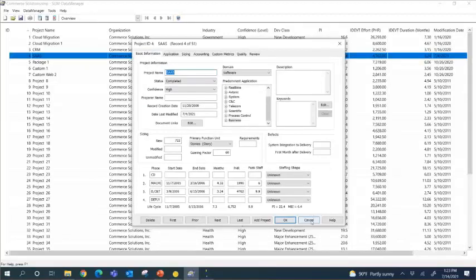And remember, we don't need hundreds of projects. I mean, it's helpful even if we can pull together 2 or 3 projects, 5 or 6 projects. So even a small sample is helpful. And we don't need a lot of data within those deliveries or projects. Even if we only had this basic information tab, that would go a long way into helping us be more successful with planning and estimating. Even if we only knew the sizing, the time, and the effort, we can calculate what our efficiency or productivity is.